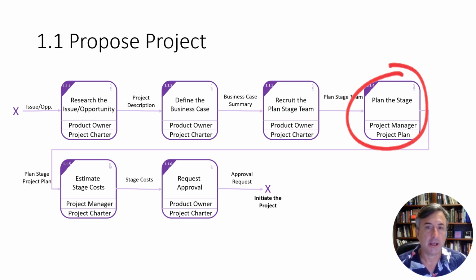Right, and how long is it going to take? Can we get this done in 2 weeks, 4 weeks, 2 months? It usually doesn't go much longer than that. You want to try to time box this whole plan stage in about 4 weeks if you can. And you come out with a little list of activities, a very, very small project plan.